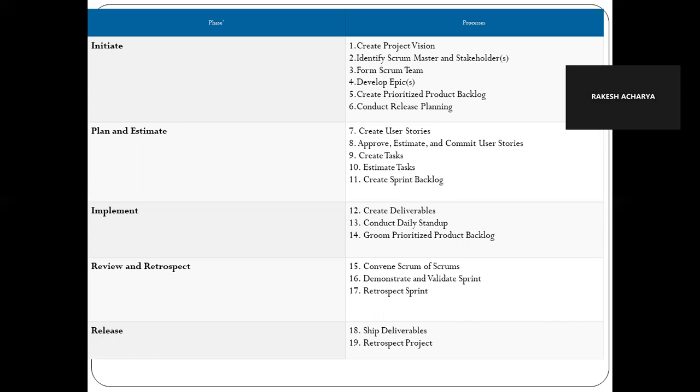At the end of each sprint, we give the demo. That is a part of the review and retrospective. I know that I am a developer and I developed something, but that is my understanding that I did the right thing. Once I show the demo, I will get feedback from the stakeholders and the product owner, and it will be clear whether whatever we have developed is right or wrong. So that's why it's very important that we hold the review meeting with our stakeholders and product owners.